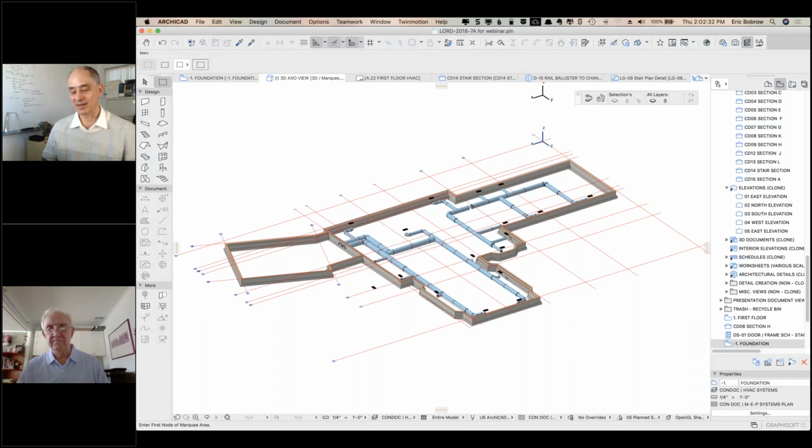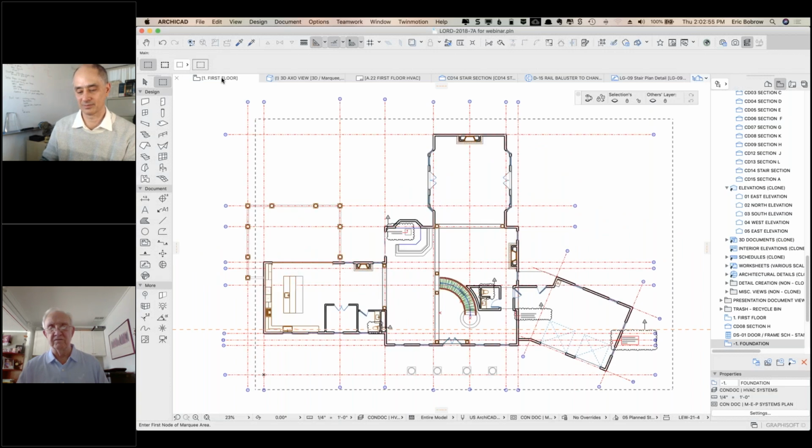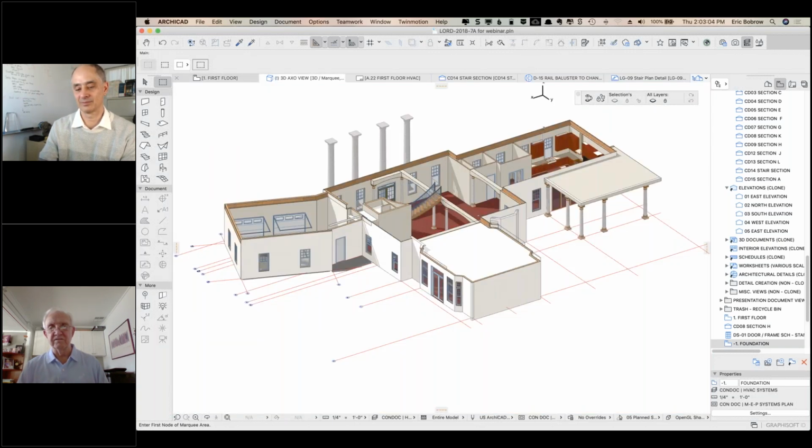So, I'm glad that you got a nice chunk of work from the fire rebuilds. You said that there was another one that was sort of coming up that you're going to be meeting on? Yeah, I have another one that you helped me on that's coming up to the building department. Hopefully it was yesterday and the day before and last week, but it isn't here yet. I'm waiting for a design review letter from the soil engineer. As soon as that's here, I can go to the county and maybe get that one permitted as well, which is a lot nicer design in a very nice area. So, right.